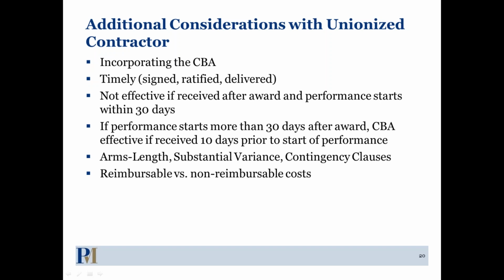I think there was another question about disagreeing with the CBA's wages being too high. It's hard to know exactly what the scenario is. If this is a new contractor bidding on a contract that happens to have a CBA, or if your own CBA wages have been too high. Ultimately, though, if the CBA has been accepted, that's the prevailing wage. That's the wage determination. When it originally gets submitted, as I mentioned, there could be that determination that it's too much at variance with the previous wage determination. And the way that works is the contractor turns the CBA into the government.